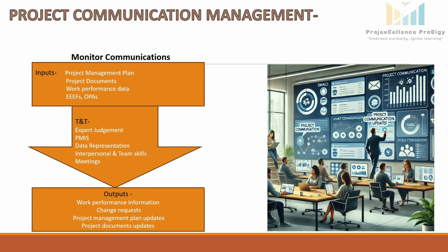For example, a survey reveals that local authorities need clearer reports on grid connection progress, which will prompt a formal change. Change requests, adjustments to communication plans if issues arise. If, let's say, suppliers frequently miss update emails, a change request may introduce a dedicated project dashboard for real-time tracking.